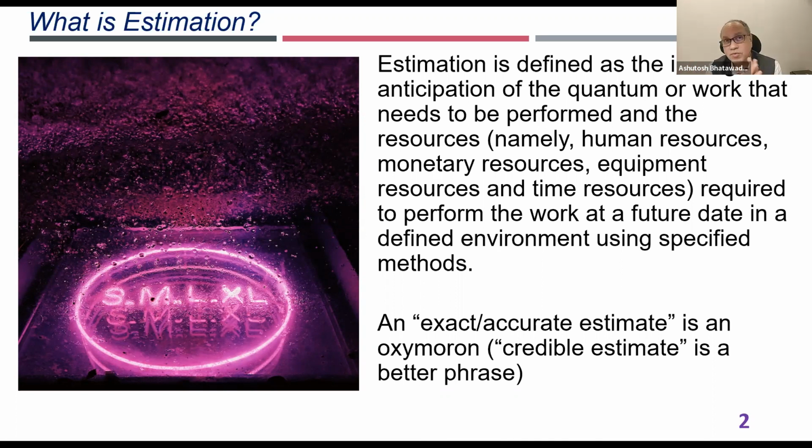And this is a second message which I wanted to give you. Rather than committing a single number as a date when your project is going to end, try to give a range. A range gives a better perspective to our customers. Rather than telling them that you will get the solution on 15th of Jan 2024, 11 o'clock, don't do that. Try to give a range of value. A range of value always operates in a better way and gels well with the customer. They also know that there's a lot of transparency in what you're bringing to the table, right? So that's the second learning.